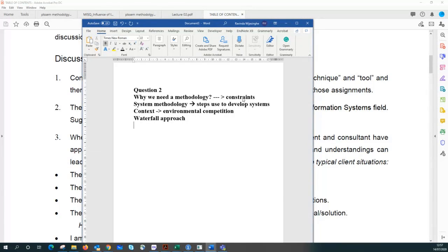But there are some projects, as I mentioned, where we can use some other method, like more iterative approaches, right? In the iterative approach, how it works is we break down the problem or the opportunity into smaller components, and then we work iteratively to solve the problem, right?